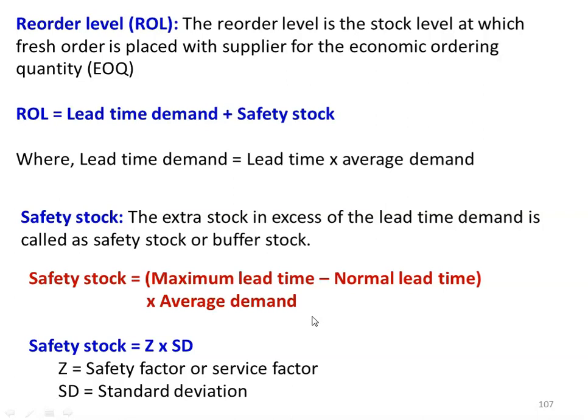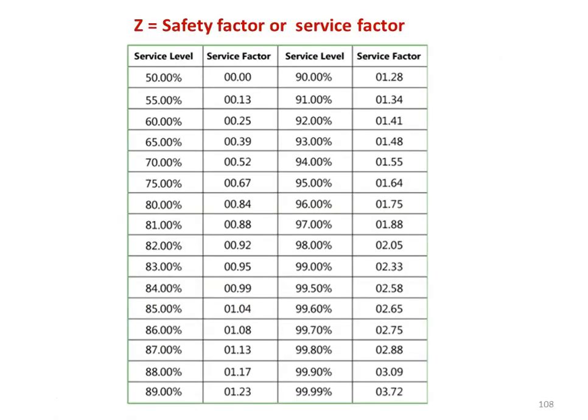Safety stock is calculated as: (maximum lead time minus normal lead time) multiplied by average demand. Alternatively, safety stock equals Z into SD, where Z is the service or safety factor and SD is the standard deviation. The service factor is taken from a standard table based on service level — for example, at 100% service level Z is 3.72, and at 80% service level Z is 0.84.